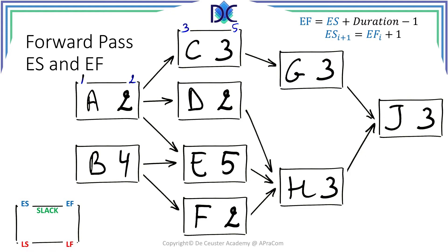We can do the same for activity D because we only have one predecessor A, so the early start of D is also equal to 3. We count two days for the duration of D. So 3 plus 2 minus 1 equals 4 and D will finish on April the fourth.